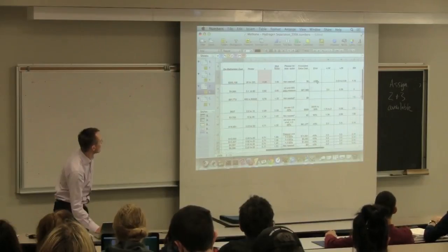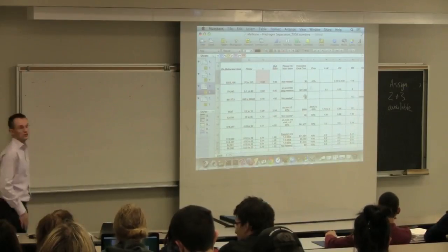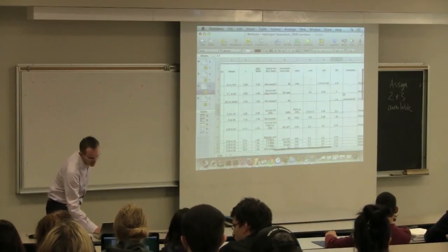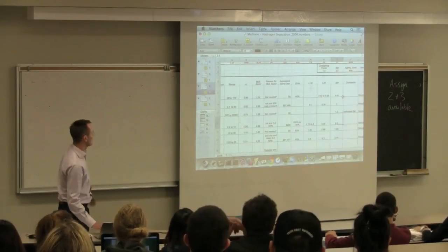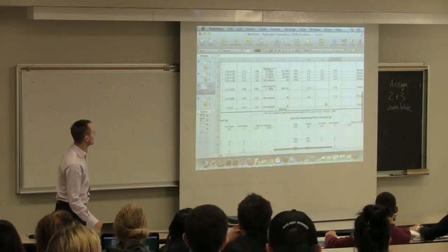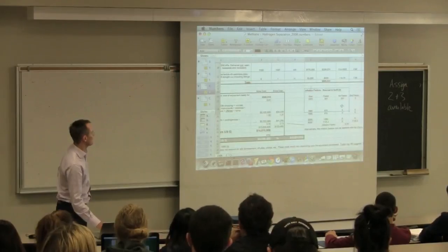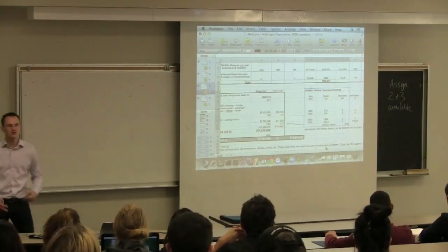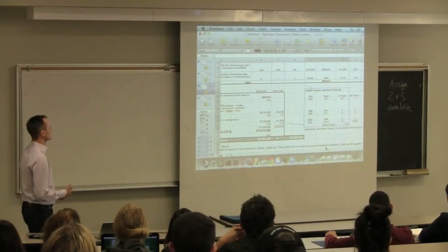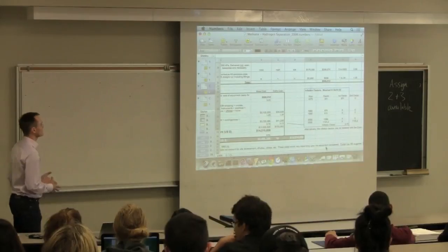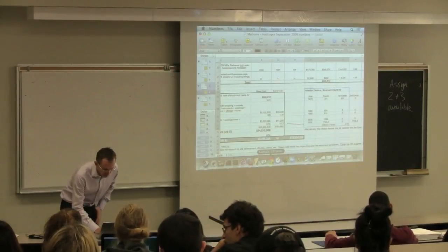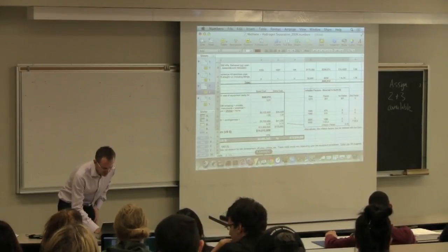There may be some additional costs due to piping that's different, due to materials of construction and temperature and pressure differences. And then the final column has the bare module factor. So for each one of these, you calculate the individual capital costs and then sum them up and then bring it up for inflation to the current year's dollars and then estimate the total cost with errors for the entire project. So this is a substantial assignment that we'll work on in Monday's class. That's really just a summary of the past three classes of work.